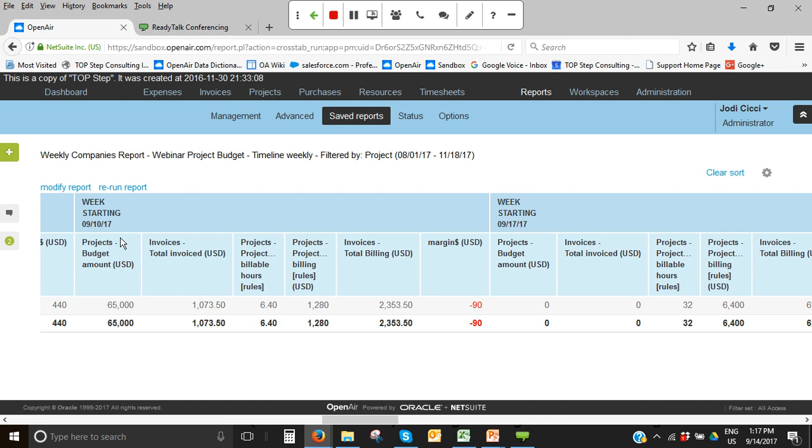because that's when I put the transactions in. So this works great when you have reports that say, okay, at the beginning of the project I got $65,000, and then I have a change order 3 months later and I add more budget in and I put a date in for that, and you can see how it impacts margin over time. But in this situation, it's very awkward to report on a weekly report with this budget value being dated halfway through where people are doing the work. So the date is very important on these budget transactions, and it's hard to do a week over week view.